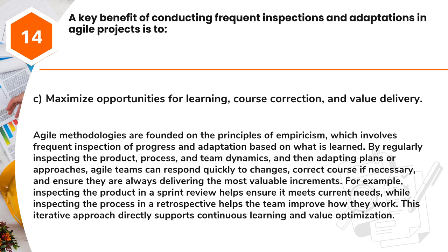For example, inspecting the product in a sprint review helps ensure it meets current needs, while inspecting the process in a retrospective helps the team improve how they work. This iterative approach directly supports continuous learning and value optimization.